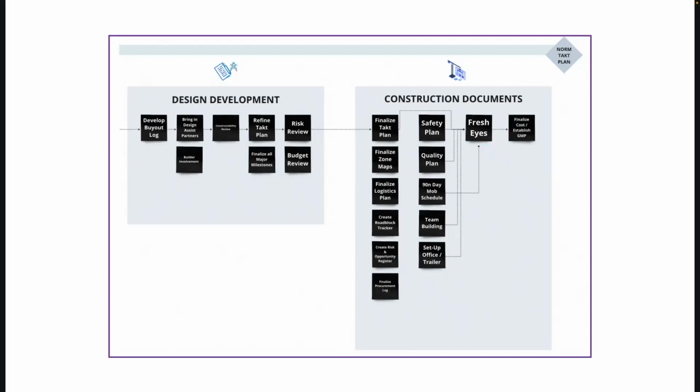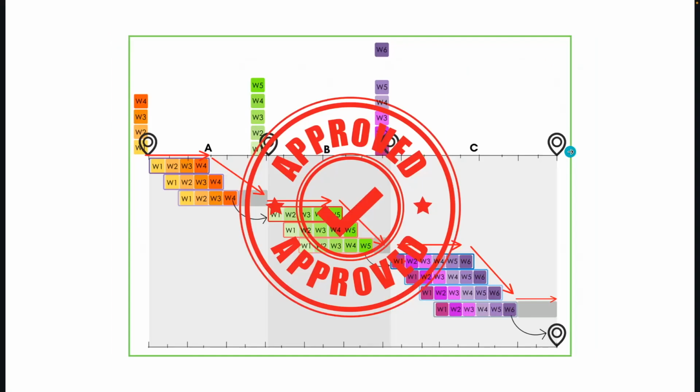So everything that we have shown you in this book from an example standpoint is only as good as your ability to review it with other team members before you go to construction. Tear it apart, find the problems, fix the problems. There's no such thing as one person creating a schedule by themselves and having it work. You can create that schedule, but you must then enable the team to own it and review it as a team. Then you can finalize your costs and establish your GMP.